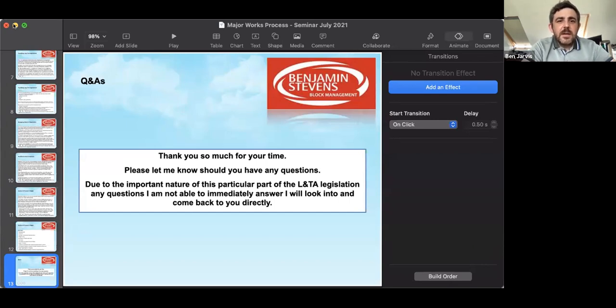This is currently our process tracker, which goes from start to finish. So we create this tracker. Obviously, we name it for the development, the client, get that all ready. We create, as you see in point 2 here, a new folder for the particular project under the applicable developments folder on our central drive. And then the next part is to get the client agreement and put that into the folder.